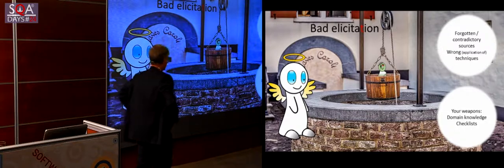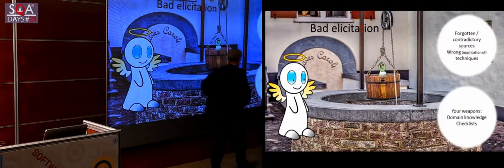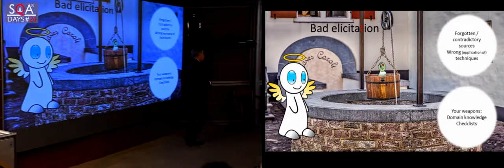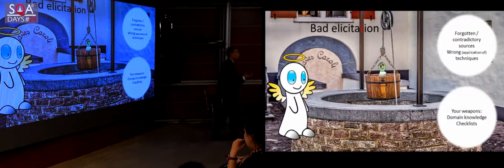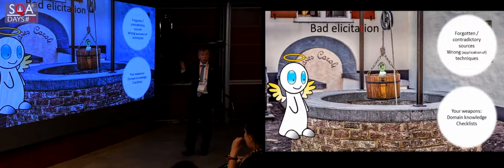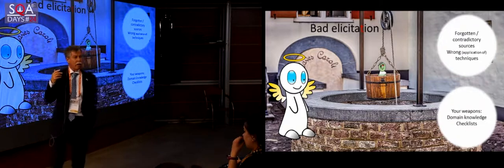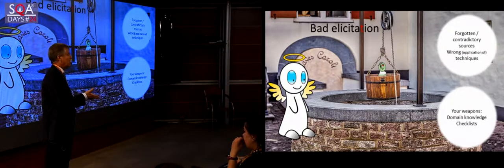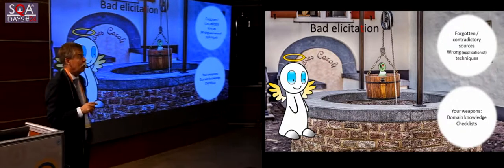Talking with stakeholders can help you to improve your domain knowledge. And another thing that could, in a way, substitute domain knowledge is checklists. Just lists that are growing in your company for common questions that you should ask about things that could be contradictory. It's very useful to prepare checklists by capturing things that went wrong in the past. If something went wrong in the past in this realm, you could add some questions to your checklist just to make sure that it won't happen to you again.